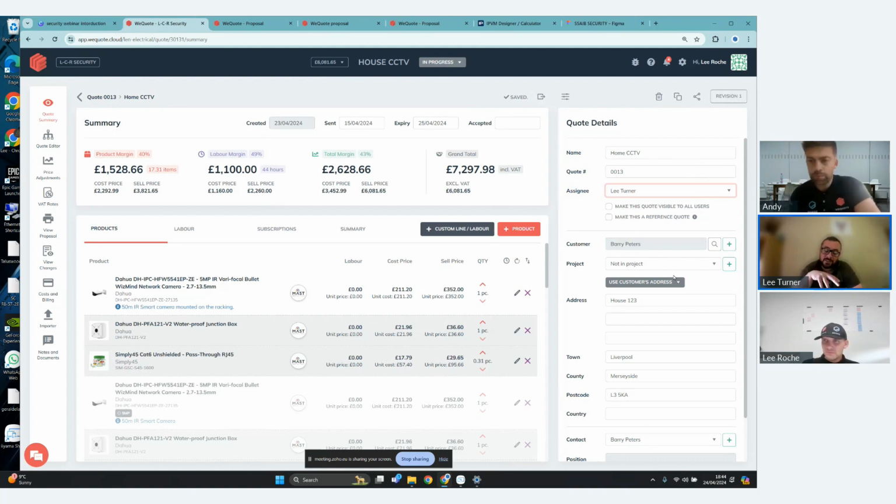You can go on, you can see the price change. If it's just a small fluctuation, you can deal with it. But if it's a big one and it's a big job, you know, you could be talking hundreds, thousands in difference. So it's good to have that visibility as soon as you come back into WeQuote. And it's a good thing where you can choose to either swallow the cost or not. Yeah. And at that point, you can approach the customer and say, since we've accepted this quote, there's been a price increase.